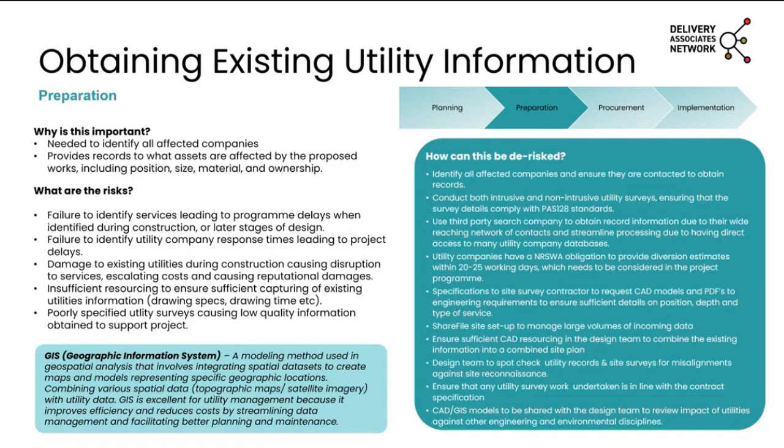These utility search companies also can provide CAD models as well, in line with our required specifications. So what we've done on previous projects is give them the CAD standard for the project, and they've produced the models in line with that. So that's meant that we've got utility models that are ready to go and can be integrated into the wider engineering and environmental design.